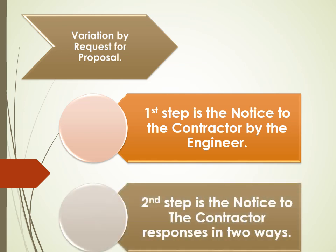The second step is the Contractor's response, which occurs in two ways. Either the Contractor submits a proposal including the issues as described in Subclause 13.1, and the Engineer responds by giving a Notice to the Contractor stating consent or otherwise — if the Engineer does not give consent, the incurred cost will be subject to Subclause 20.2 Claims for Payment and/or EOT. Or, the Contractor does not submit a proposal but describes the reasons for not submitting, explaining the situation by reference to the issues described in Subclause 13.1, Right to Variation.